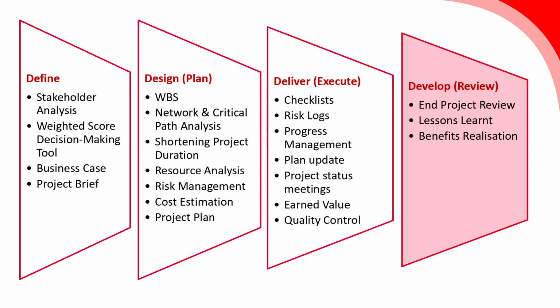Maybe after a few semesters we can start seeing if the benefits have actually been realized or not. So oftentimes the develop phase is again monitoring the long-term benefits realization, perhaps 6 months, perhaps a year, perhaps 18 months or 24 months after the end of the execution phase, where we're checking to see if the benefits in the project have actually been realized.